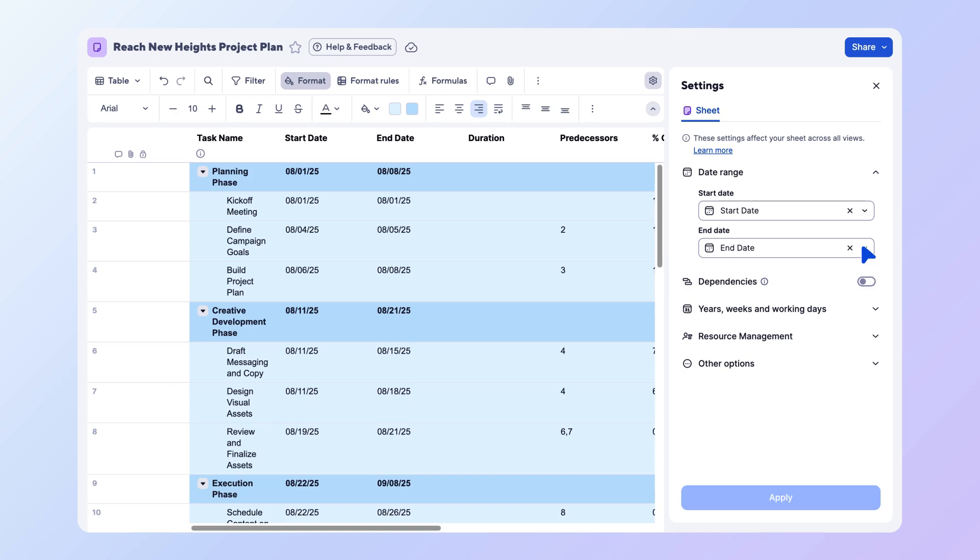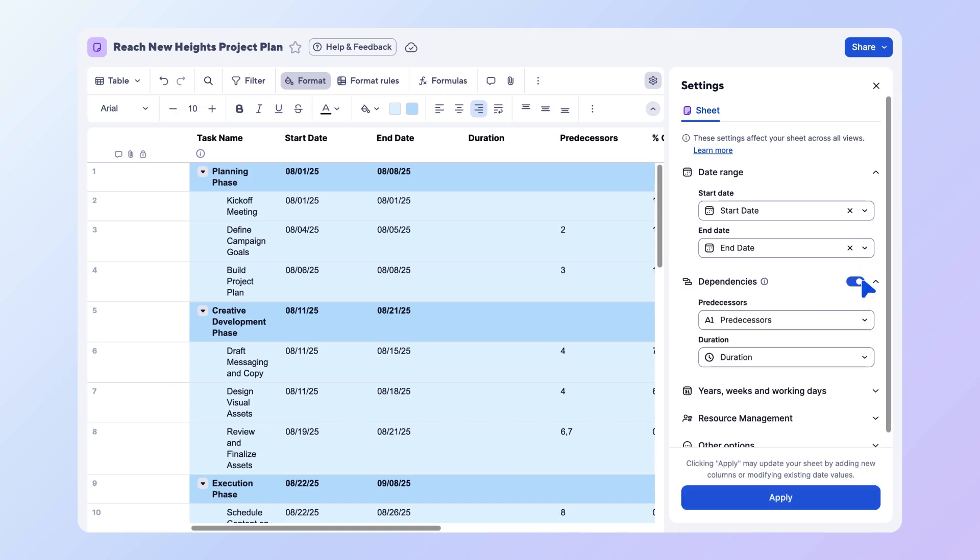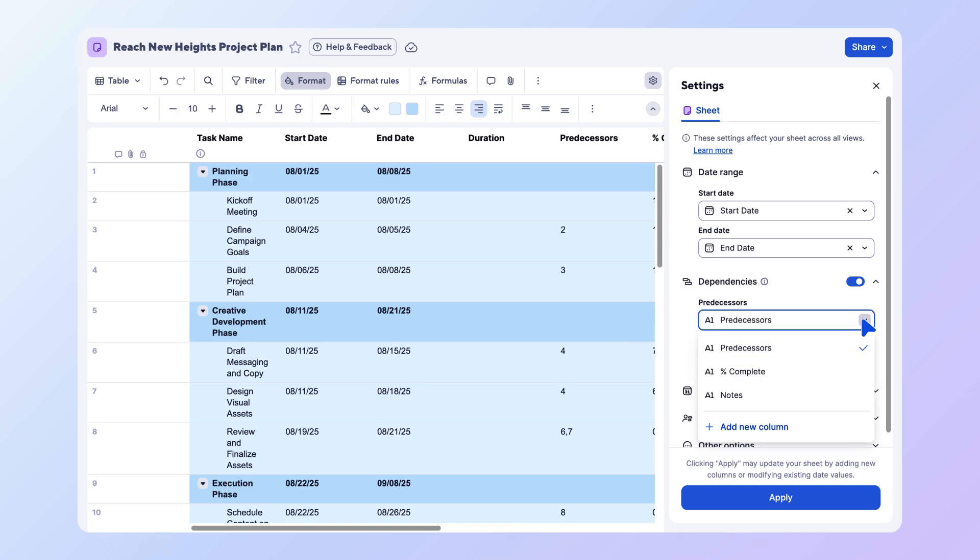Next, toggle on dependencies. Like the date columns, existing predecessor and duration columns will be detected. If you don't already have those in your sheet, choose the option to create new ones.